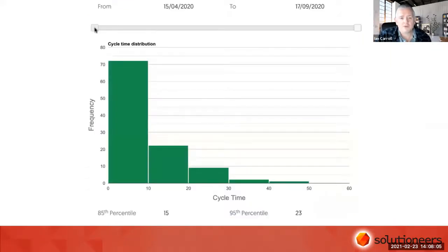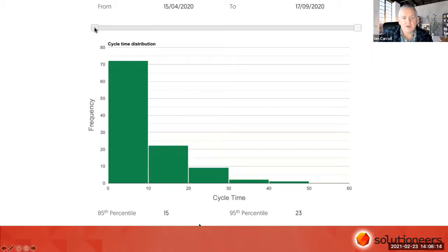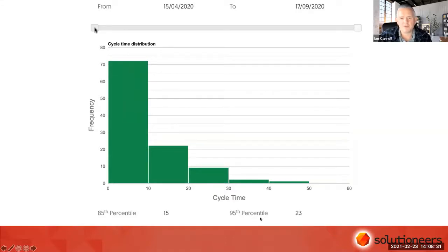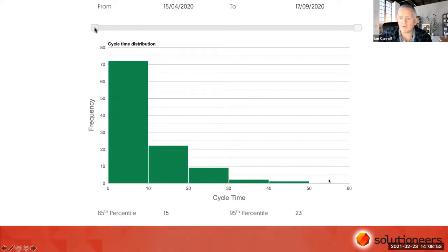Another method is looking at cycle time as a distribution in a histogram. Here, 85% of work items were delivered in 15 days or less. If people want to be 95% confident, 95% of our cycle time data points took 23 days or less. Different teams have different distributions — the further out to the right, the longer and fatter the tail, the less predictable the team is likely to be. One technique we use is called 'trimming the tail' — looking at what sources of variation are affecting our predictability.